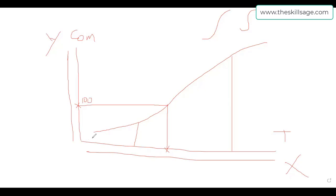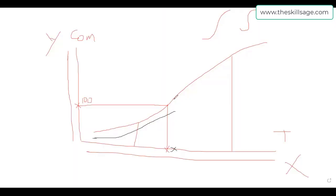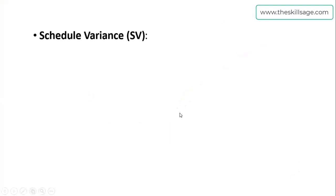On the other hand, when site progress is going on and we are incorporating all the data in our progress sheets, a second S curve will be generated automatically. This is the planning phase S curve. By visualizing these two S curves, it is very understandable that in planning I thought at this cutoff date I would be at this stage, whereas in actual I am here. That is variance. A naked eye can help me track my project status. Anybody—stakeholders, client—can understand, same like cricket matches where two teams are playing and you can realize the performance of each team.